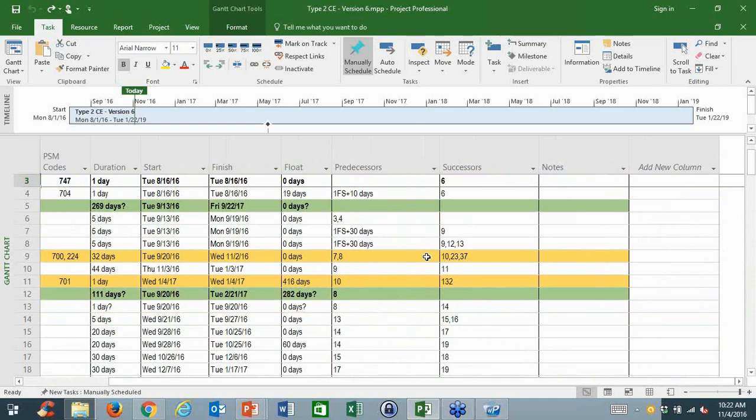We wanted to make sure that decisions made in the middle of the PD&E, as I mentioned, changes in delay and right-of-way cost estimates. We wanted to develop these relationships so you can see how changes in something like this can impact your production date. For example, if you know your SEER approval date is so-and-so, but there's a delay in the public hearing, we have defined successors and predecessors for almost every activity, so we can have that relationship.